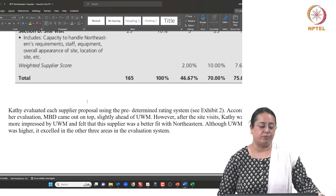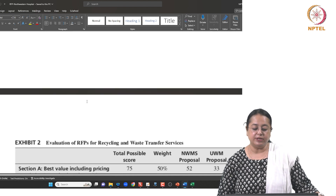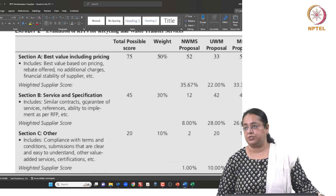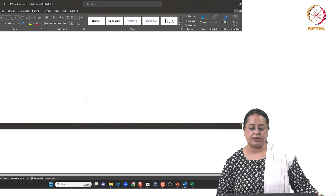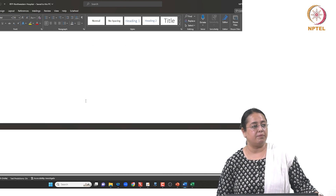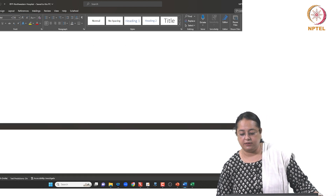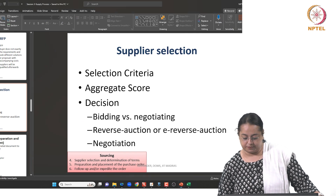To summarize: when using a request for proposal, specifications may not be fully defined and the lowest cost is not the sole criterion. However, if it is a request for quotation, all other specifications are clear and one can straightforwardly compare prices and place the order.